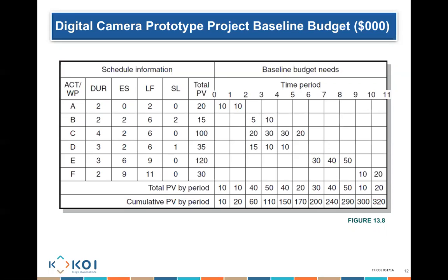Well, no. Okay, look here. When you create your plan and you finish the plan, you save what is known as a baseline. Can you see this? This is a baseline. The baseline will tell you at each period of time how much money you're supposed to be spending, which is how much you're planning to spend to finish the job.